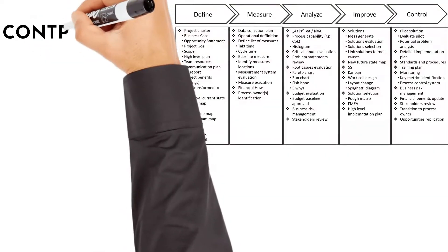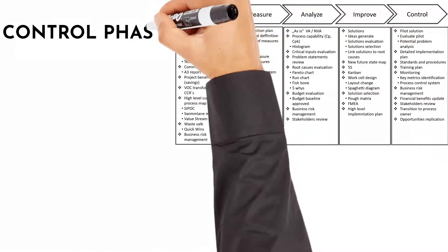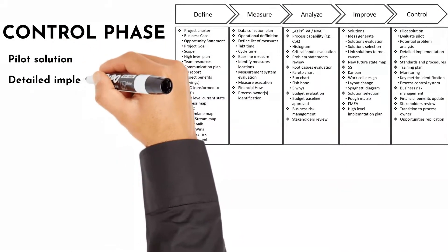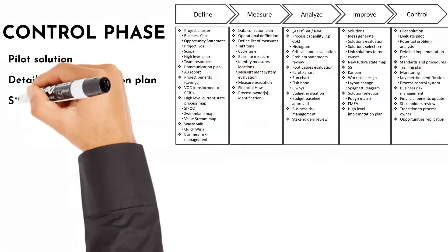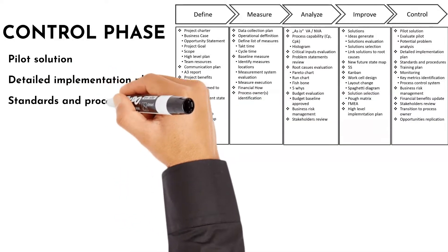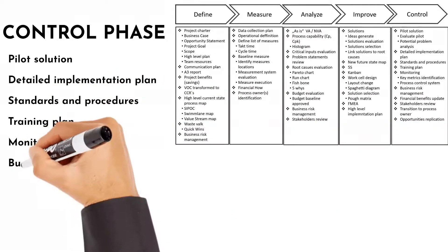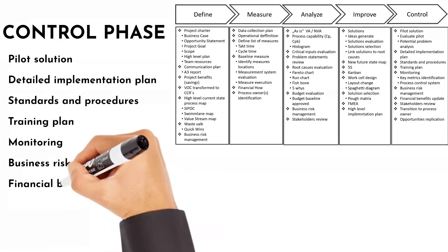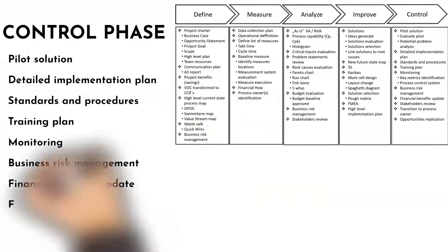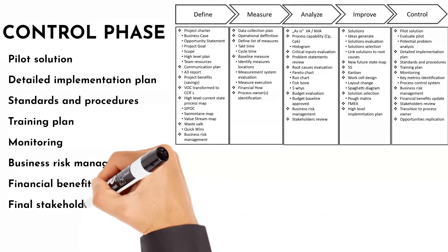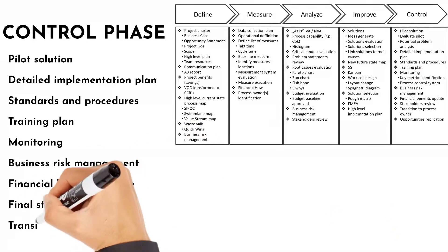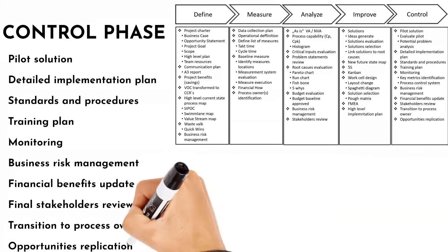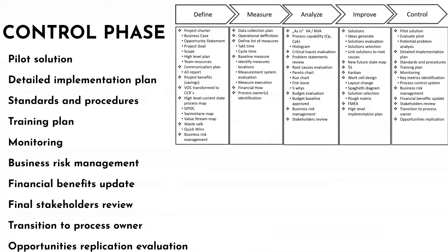And finally, the Control phase main tools are: pilot solution, detailed implementation plan, standards and procedures, training plan, monitoring, business risk management, financial benefits update, final stakeholders review, transition to process owner and opportunities replication evaluation.